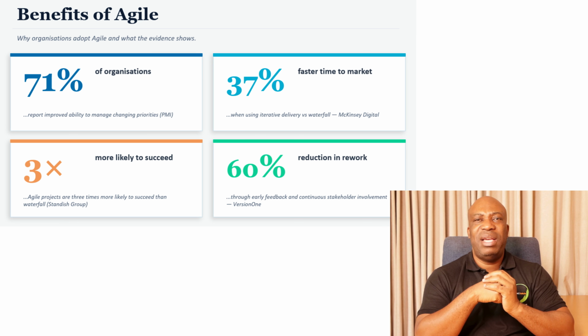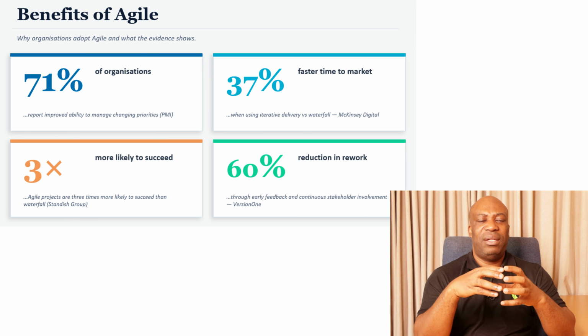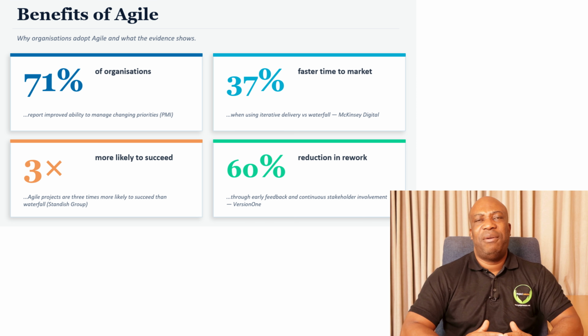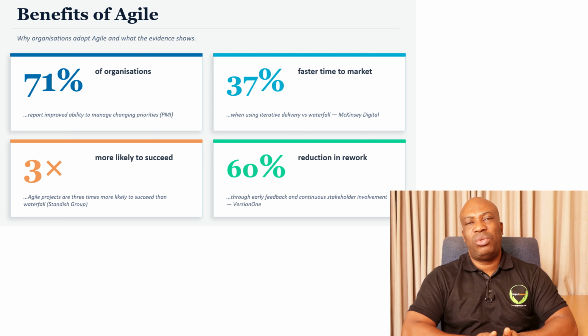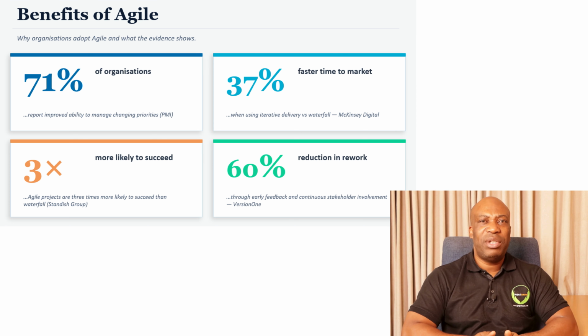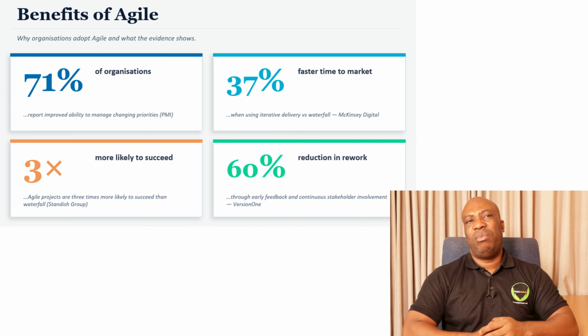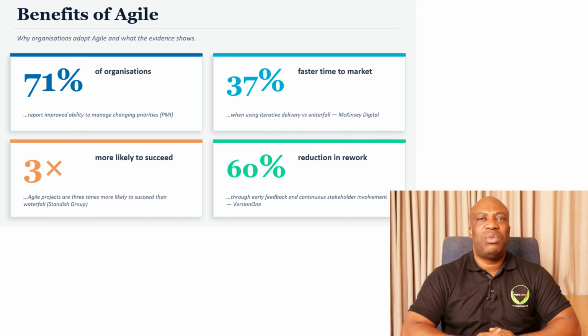You might be asking, why is that? It's because in Agile, you are focusing more on producing or creating as many requirements as possible. You want to complete as much scope as possible within a specific time and cost, as compared to predictive, where you want to make sure that you have a specific scope that you have to complete within a specific time and cost. So you might spend more time on the items which are not giving more value to the customer as compared to spending more time on what is giving value to the customer.